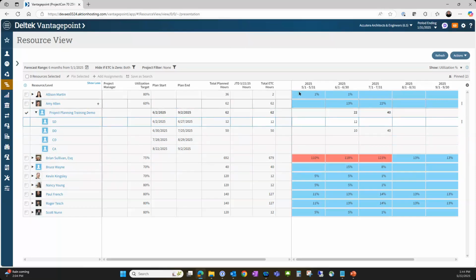So this is a nice view in here, right? Under the actions, I can check in. If somebody had a plan checked out, and I'm in this view and I'm trying to make updates, I can do a check-in. A check-in will save whatever information the other person had in their plan.